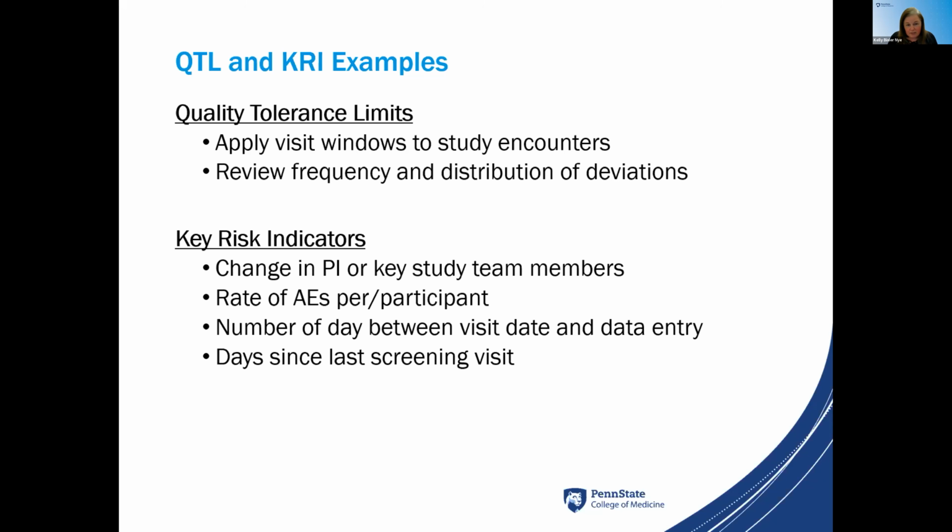The number of days between visit date and entry could be another trigger to contact the site and remedy the late data entry and make sure that the data is being entered in a timely fashion. Days since last screening visit could also trigger a contact with the site and the site PI to determine if there's barriers to screening and recruitment at that site to make sure the recruitment stays on track for the study.